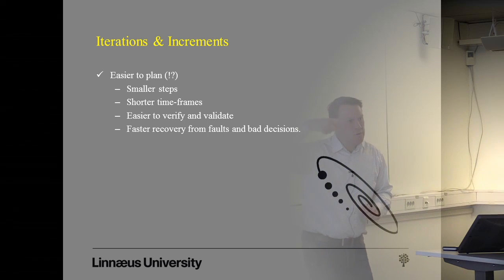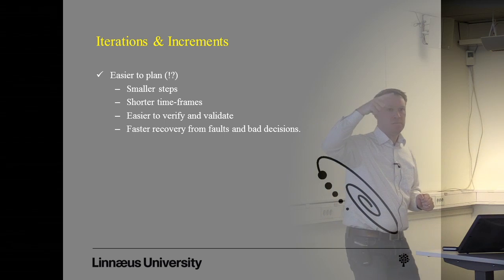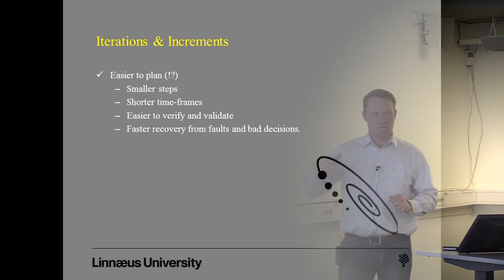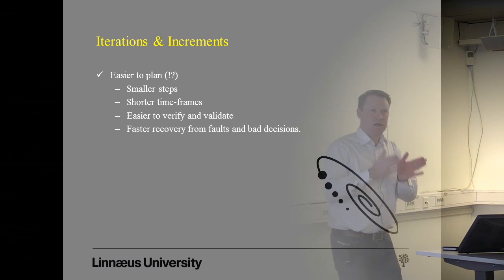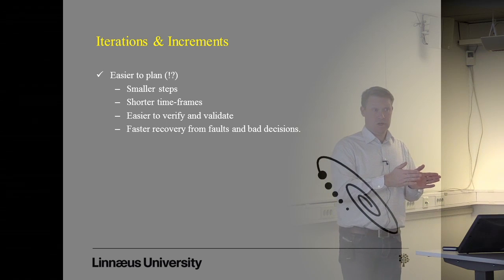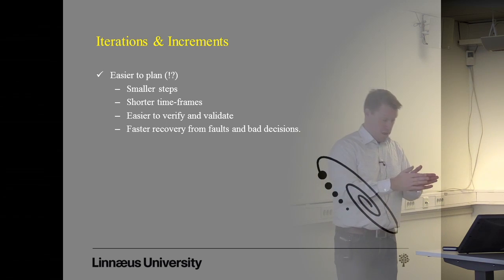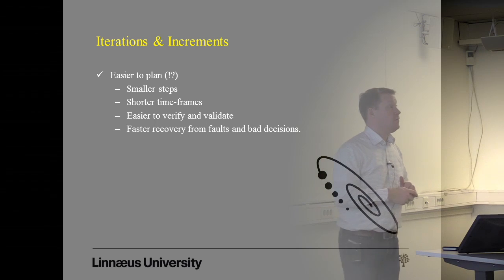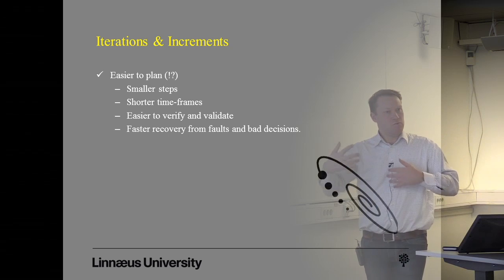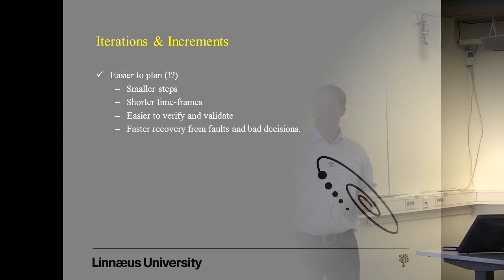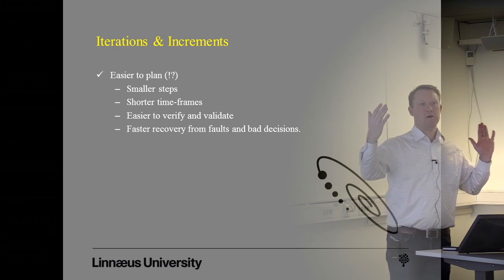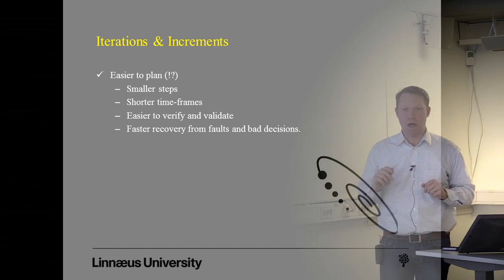So if we can shorten the time in between these interactions with customers, we will have smaller steps. We will actually have a sequence of smaller projects. It will not be one huge project. It will be a sequence of smaller projects with feedback that we can use to improve. And we all know that smaller time frames are much easier to plan.